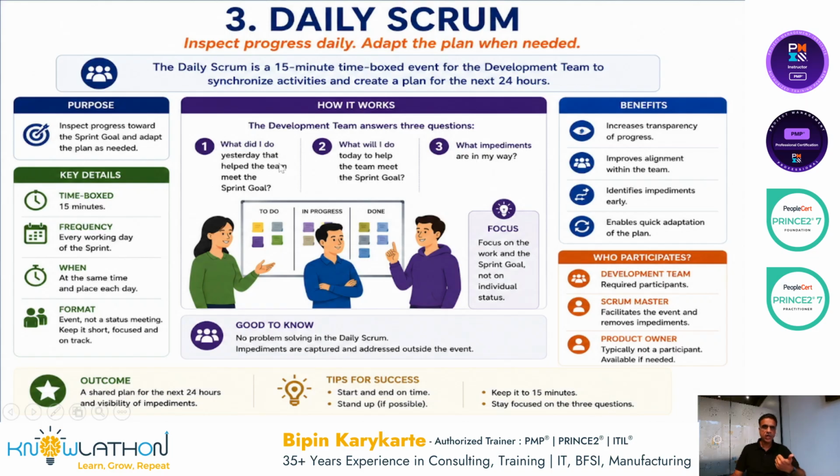What are those 3 questions? What did I do yesterday that helped the team to meet the sprint goals? What will I do today that will take me further? And are there any impediments in my way? These are the 3 questions which are the heart of this particular daily scrum.